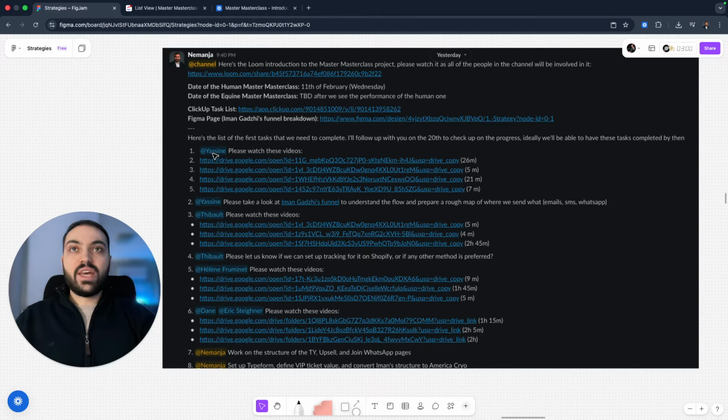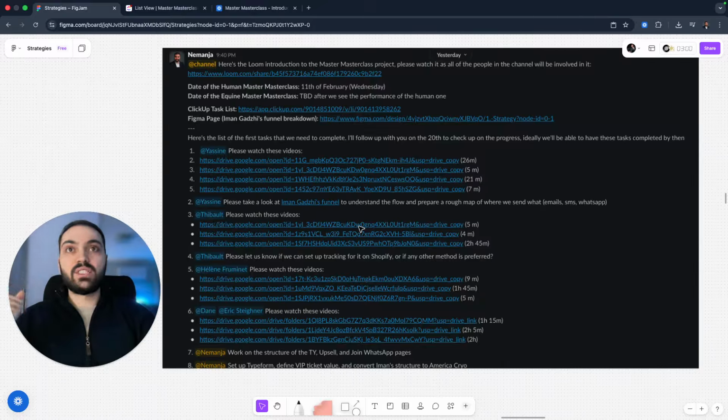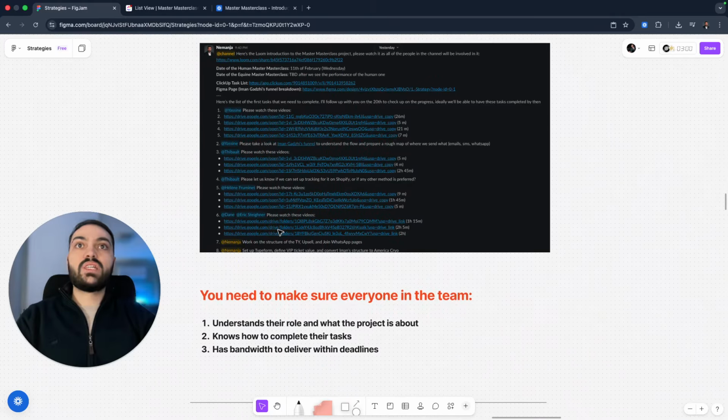So we have everything dedicated to each team member. For example, Yasin, who's our email marketer, first needs to watch these course videos and then take a look at the funnel to understand and map where we are going to use SMS, emails, and WhatsApp messages to follow up with our leads. Tibbs, who's our ad manager and ad creative strategist, is going to do this and this. Helen, who's our sales manager, is going to do this. Our speakers are going to do this. I'm going to do this.